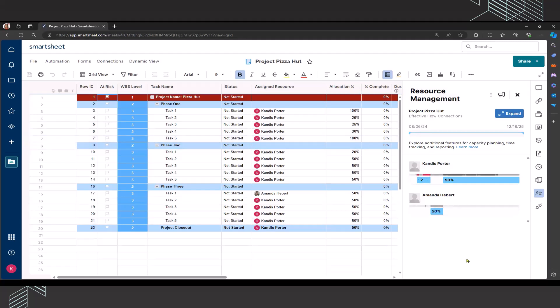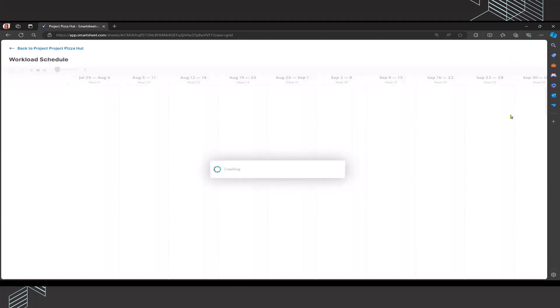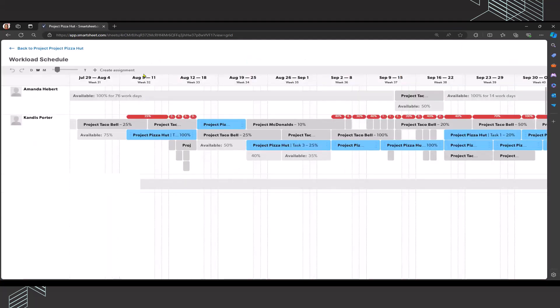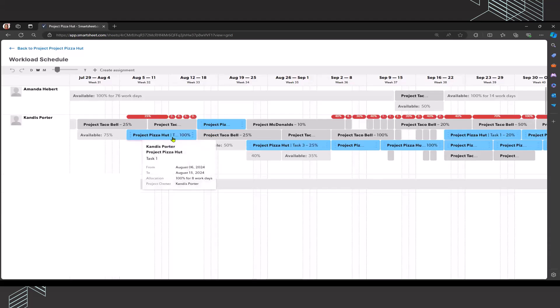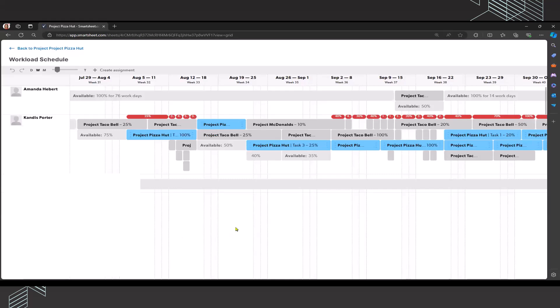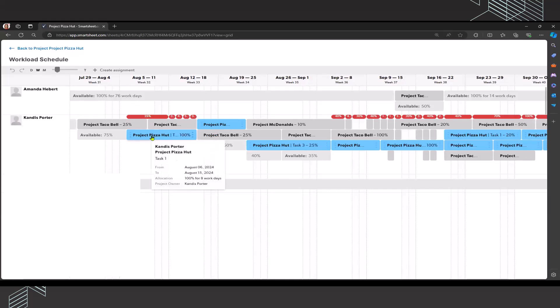And this is where we were looking at August 5 through 11, where I'm 25% over allocated. I am assigned at a hundred percent to project Pizza Hut. When I'm looking at the other resources that are assigned to this particular project, we have Amanda that is also assigned to it. And she's actually available at a hundred percent during that time period where I'm over allocated.